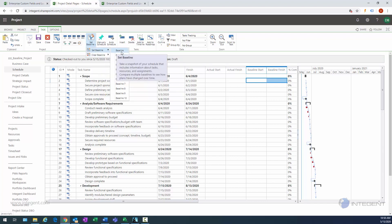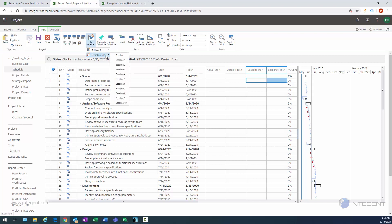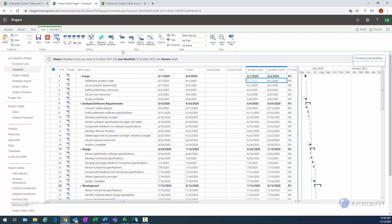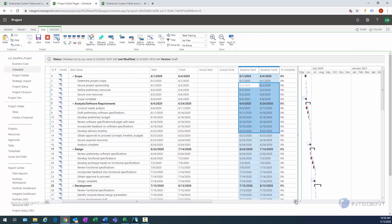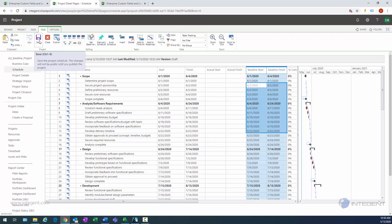When I click on Set Baseline it exposes a couple of options. You have the option to set a baseline — you'll notice you have baseline zero through ten, meaning you have the ability to save eleven different baselines — and then you have the ability to clear a baseline. You may want to clear a baseline if, for one reason or another, you saved the baseline and then the project was delayed. Saving the baseline is very simple: just select whichever baseline you want to save it in. When we save the first one we typically start with baseline zero, and once saved, notice that your baseline start and finish dates are suddenly populated.